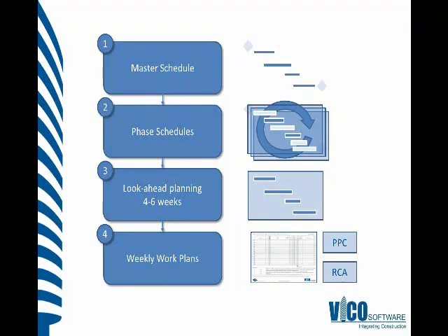It's a lot more collaborative. It's built on the fact that the last planner, who is the last planner? The last planner is the person responsible for those activities, and deciding at the last responsible moment how they're going to carry out and how they're going to achieve the overall targets. It's a really very good and structured approach to pull planning and also the controlling on the construction site. So the granular day-to-day commitments that are required in order to achieve the plan.